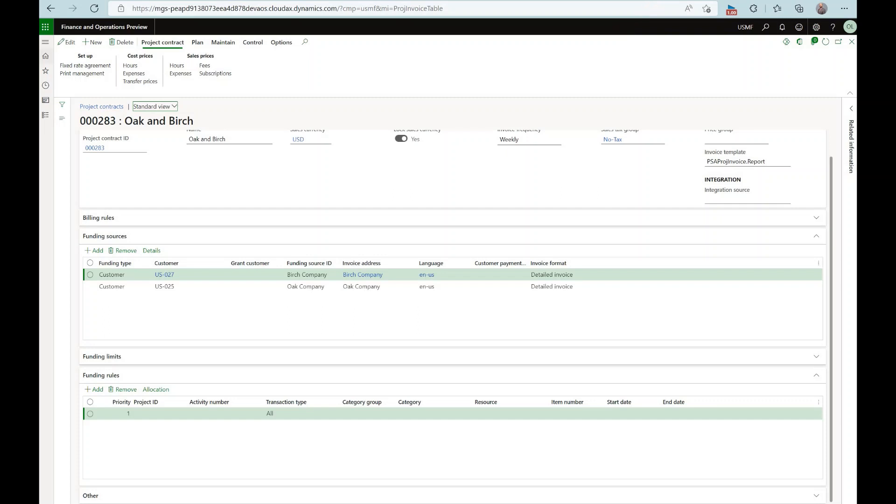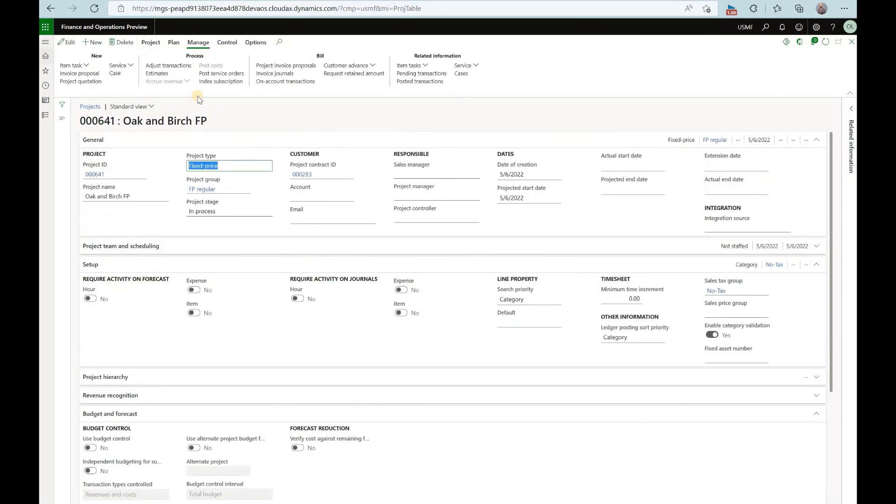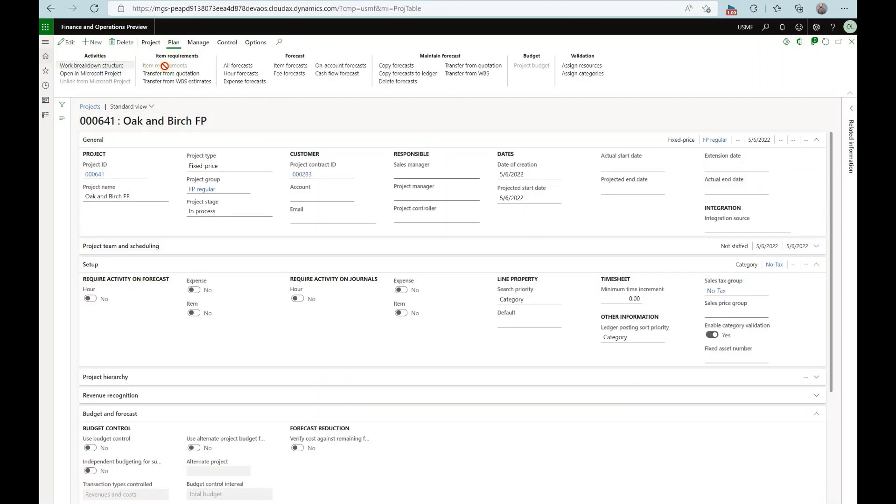Now if I want to check the fixed price project I'll check under plan and I can see that item requirement isn't enabled. So it's quite typical for the fixed price projects not to allow the creation of the item requirements.